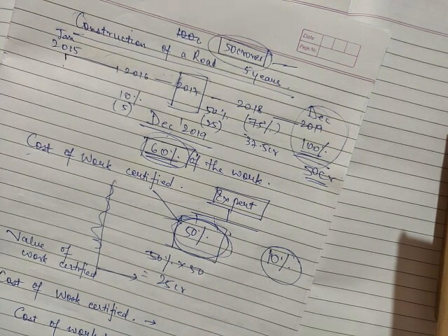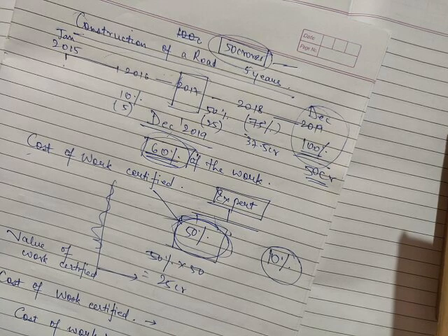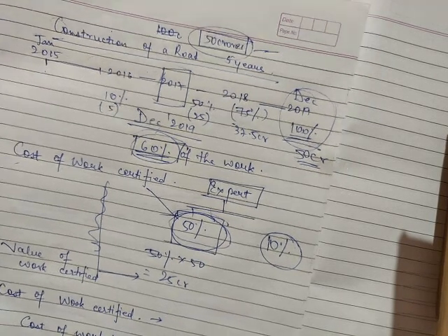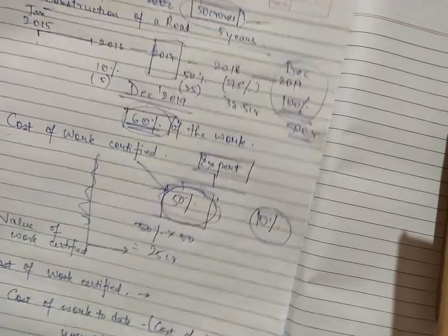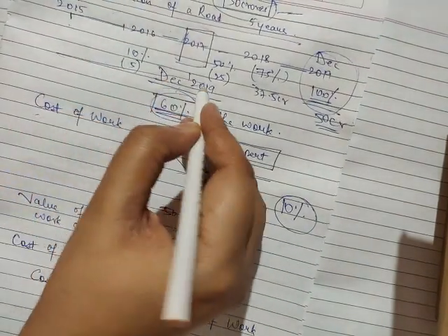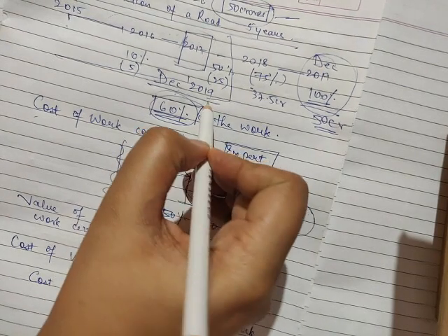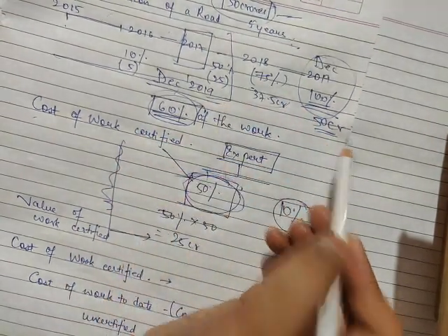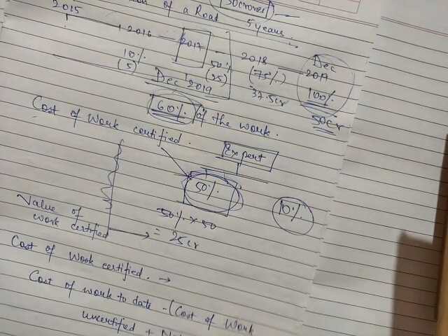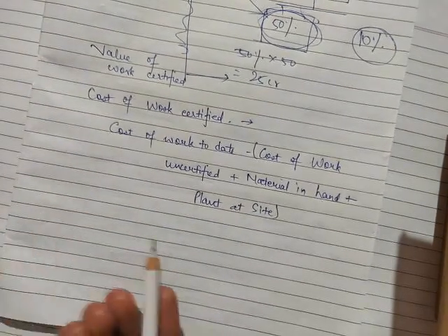So this is known as progress payment, that as you finish your work, you will keep on getting a part of your payment. So this can be decided on the basis of the timeline. That is, by the end of the third year, you would have got 50%, the fourth year 75%, and so on. It can also be dependent on the proportion of work done.